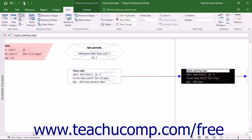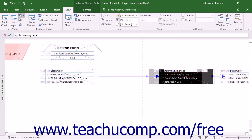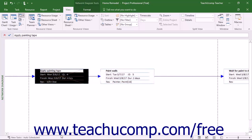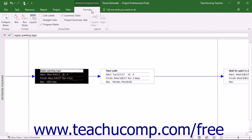Within this view, each task is represented by a box and information about the task appears on the lines in the shape. Critical tasks appear red and non-critical tasks appear blue. Tasks that are linked together appear with a connector line between them. You will also see the Format tab of the Network Diagram Tools contextual tab appear within the ribbon, and you can use the buttons within this tab to change visual aspects of this view.